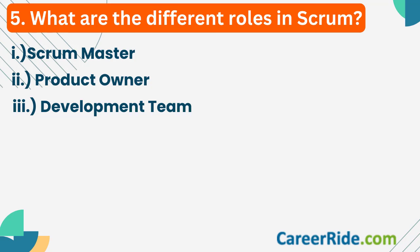Question number five: what are the different roles in Scrum? There are three primary roles in Scrum, together called the Scrum team. Number one, Scrum master — this person is not actually a project coordinator, manager or boss; he basically helps the team with proper adoption of Scrum. The second is product owner, the person who works as the voice of the client to the development team. He defines and prioritizes the product backlog, makes decisions on features to include in each sprint, and ensures the product meets client expectations.